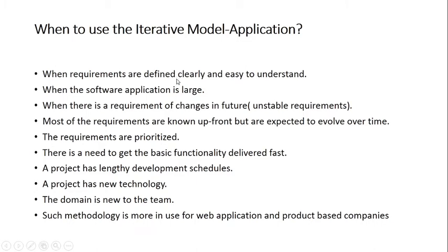If it is a small or medium sized project, we avoid the iterative model because here we have repetition of steps. So ultimately you are repeating the same steps again and again. So the cost will be more, definitely. Time required is also more. Effort required is also more. So there is unnecessary wastage of resources for small and medium sized projects.